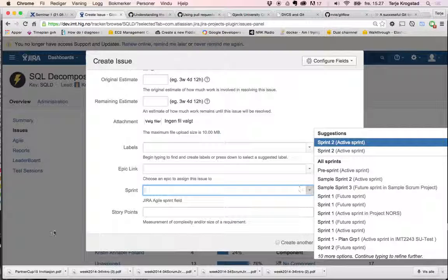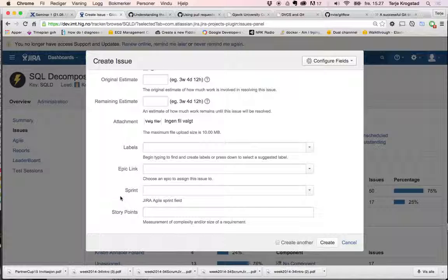Yes, and what sprint it's assigned to. So when you're planning your sprints, you should go into each issue that you want to put into the sprint backlog and register it for the sprint that it's going to be done in. Okay? That happens when you assign it to the sprints. So you don't need to edit each of them. No. If you assign it here, yeah. That means you created the issue while the sprint was going on, while you're starting the sprint.